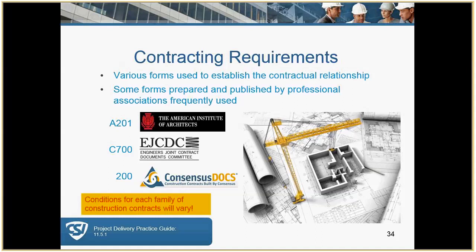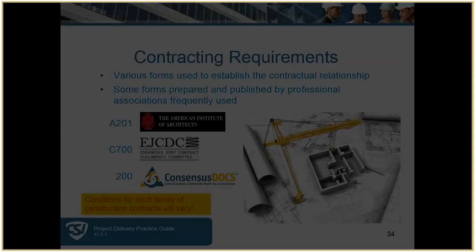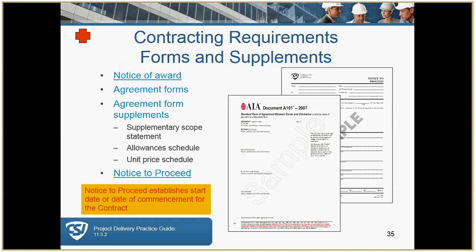The contract forms are generally pre-printed and should be bound in the manual. Keep in mind that these documents are also copyrighted, so you simply cannot bind the original in there and make copies of it, which can be rather expensive to do for bidding on a small project.